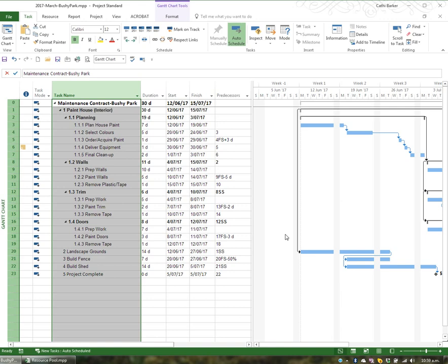When you assign a resource to a task and you say, okay, they're going to spend 2 hours on a task, and then you change your mind, if you change that 2 hours to say 20 hours, then suddenly the task duration will shrink because more hands, less work. If you suddenly assign somebody to a task and then you say, oh, they can't work full time, they have to work half the time on it, then suddenly the task will take twice as long.